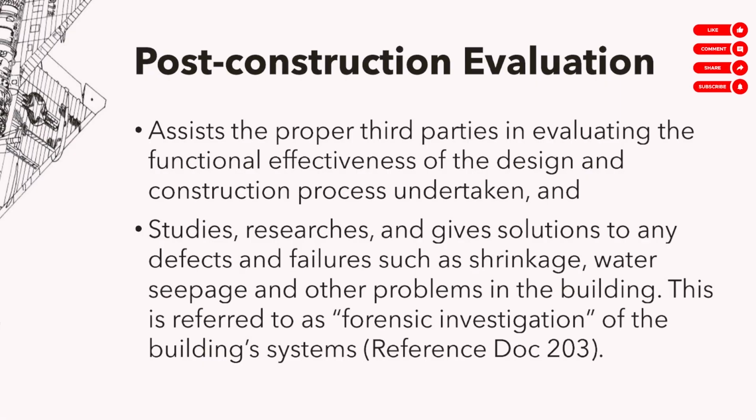Also in post-construction evaluation, there's assisting proper third parties to evaluate the effectiveness of the design and of the construction process. For example, you decided to prefab the whole building, at least the architectural components. Was it really effective? Did you really save enough money? Did you really do it that much faster? Was it really as good as conventional?